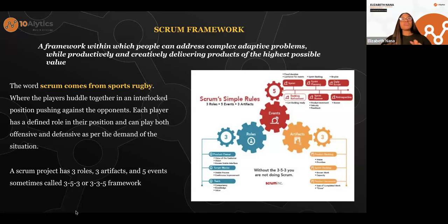Now, to build that looks like a huge project, but we need to break it down if we want to work the agile way, all right? So we break it down and say, you know what, let's work on a feature to allow people create an account first. After that, let's work on a feature to allow people log in, because after creating an account, the next thing you do is to log in with your credentials, correct?